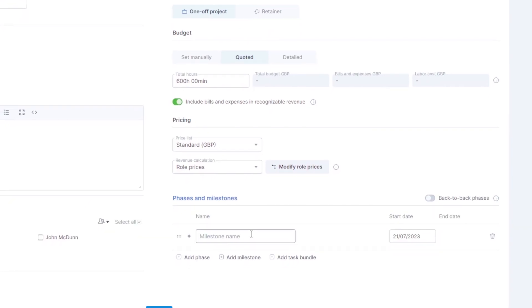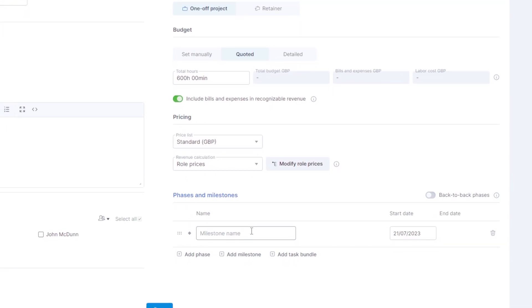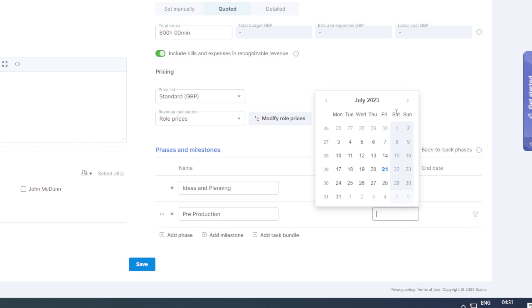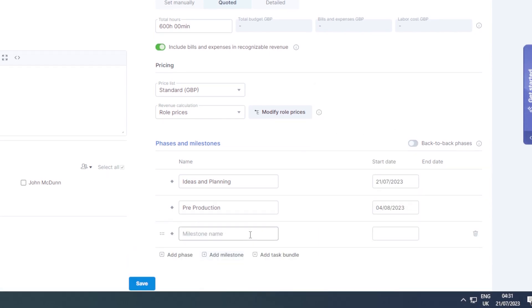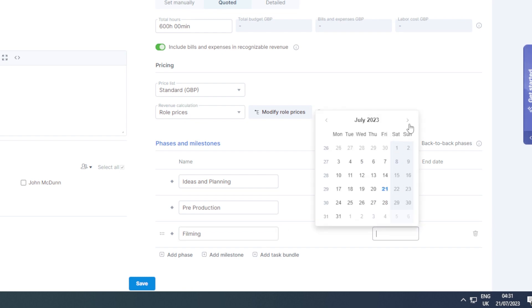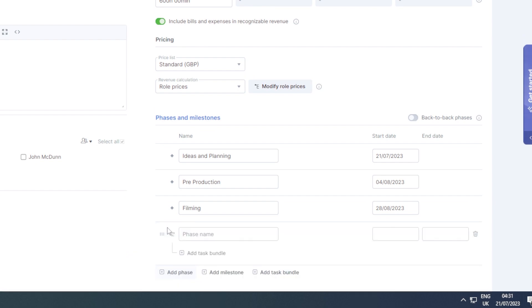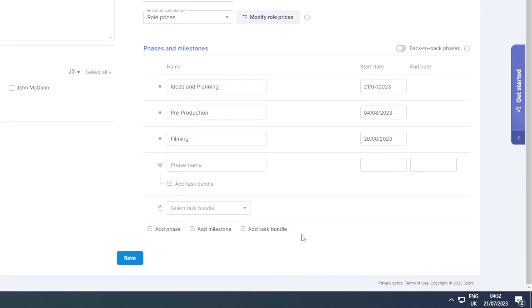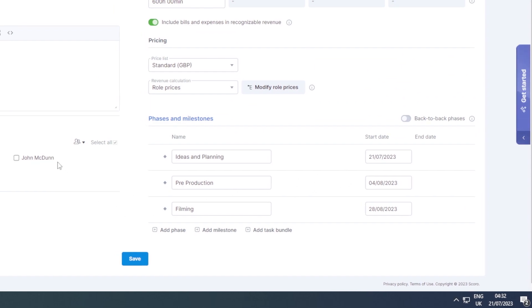Now we can add milestones. For a video production project, we might add 'Ideas and Planning' starting today, then 'Pre-Production' about a month later with two weeks of planning, and then 'Filming' starting in the last week of August. You can explore and add different phases such as a delivery phase or preparation phase, and add bundles as needed for your workflow.